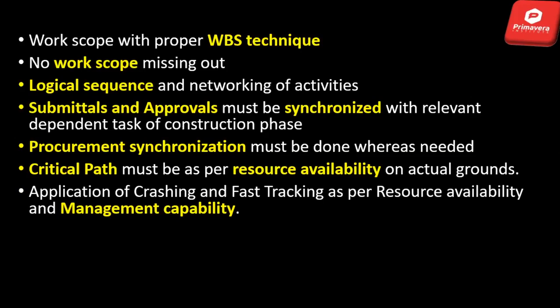And sometimes in the planning phase, we apply crashing and fast tracking techniques to reduce our timeline, but there is a certain limit, which is called management capability. Sometimes you enhance resource limits through crashing and fast tracking and reduce the project timeline. But sometimes you have to consider your supervisory role, your management capability. Okay, that is the sixth point.